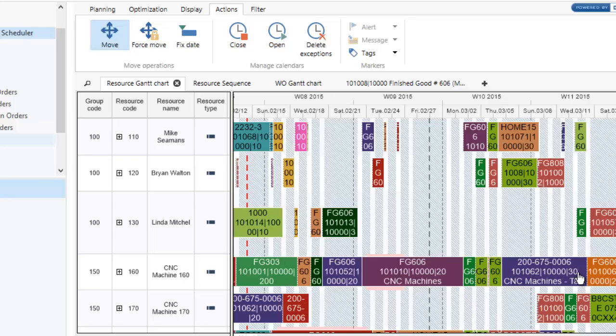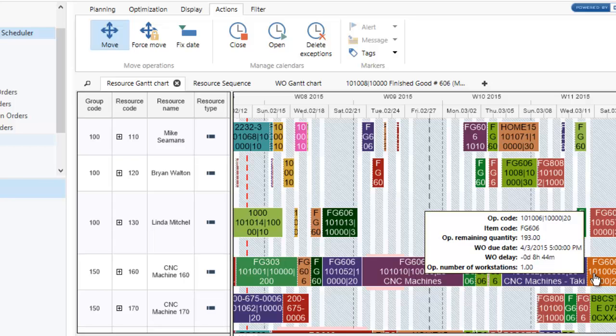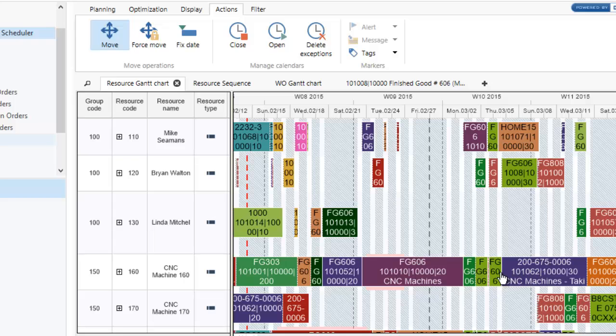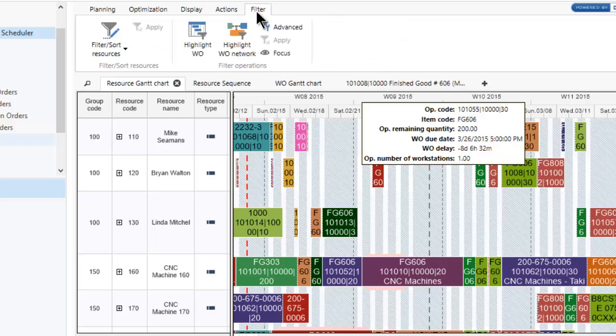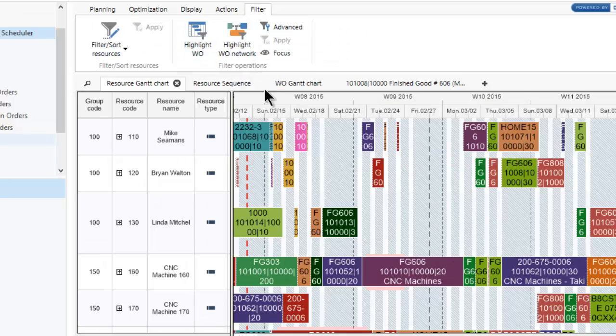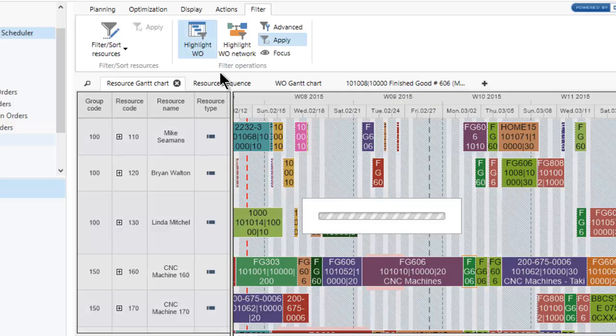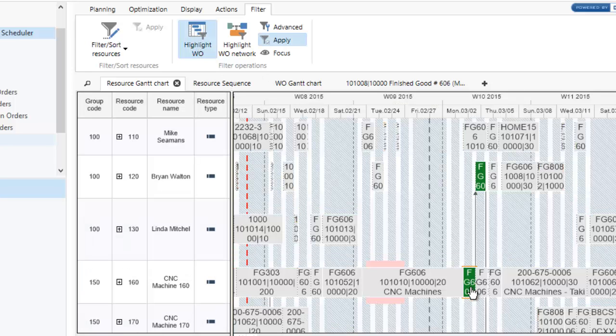All the successor activities get pushed as well, and if any one of these has successor activities, which you can always kind of follow via the network diagram, so you can click on an activity and say, let me see what other activities are affected with this.